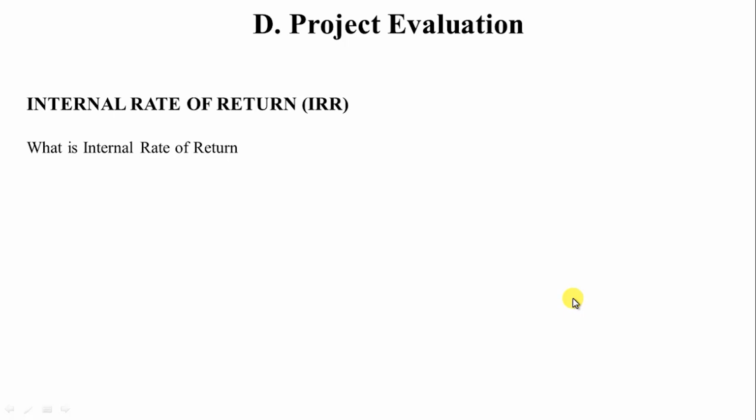That means you are neither in a positive state nor in a negative state. And then based on that rate of return, you determine whether you should accept the project or not by comparing it with the company's required rate of return. Before that, this method has to be done by mathematical trial and error. There's no such definition where you can just use one single rate, assume it as a discount rate and carry on computations. No.